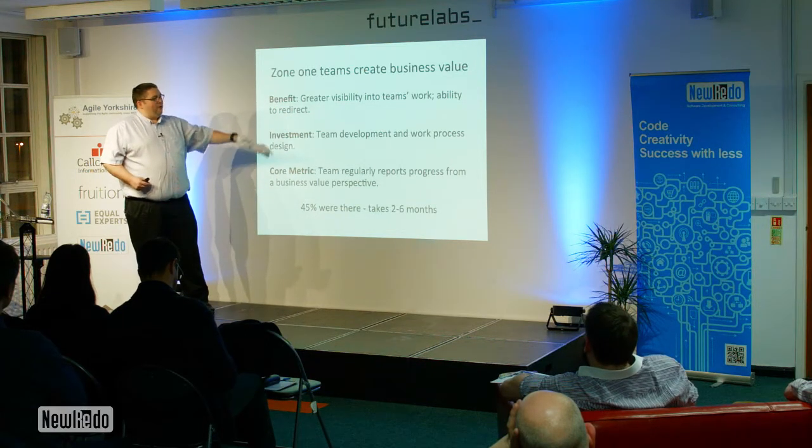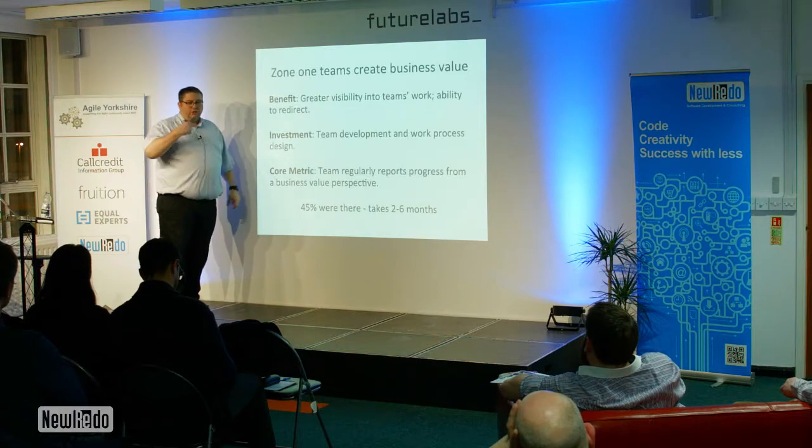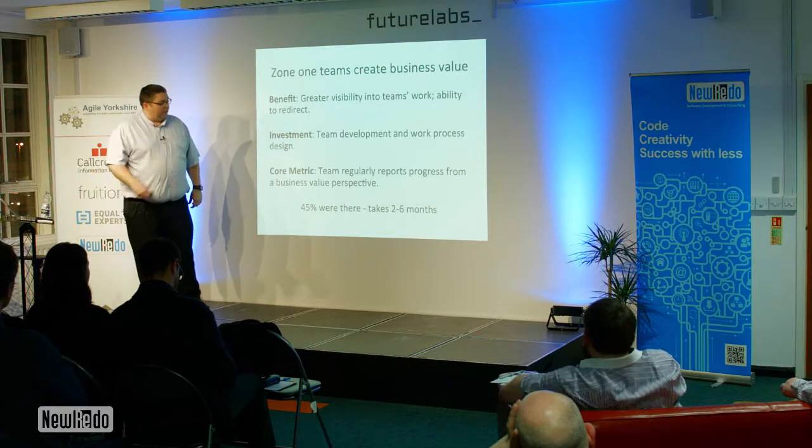And I've said this before, around, if you use that format, you can get a lot of developer technical debt stuff done. So "in order to deliver faster, as a developer, I want to do this." Then the business read that: "to develop faster, I'll have that," rather than "as a developer," they won't read it. So if you turn everything to be value driven, people tend to pick it up.